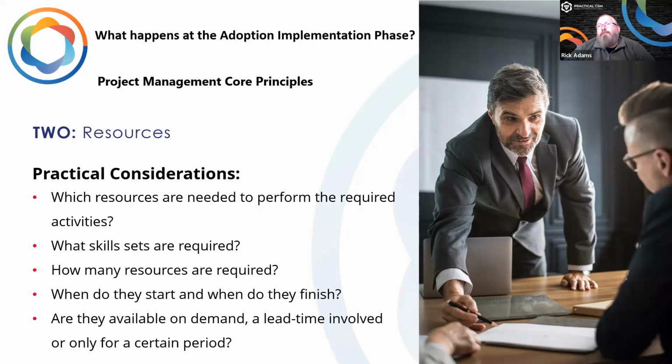What skill sets are required for the trainer? They've got to have product knowledge and the ability to train and communicate and to be a good teacher. How many resources? In what languages, for example? Which languages does the trainer need to talk? When do they start? When do they finish? Are they available on demand? Or, for example, is this an internal instructor, or is this a third-party instructor that's paid for on a day rate and may not be available every day? They may only have certain availability in their schedule. So we've got to think about all of those sorts of practical considerations around the resources that we have.